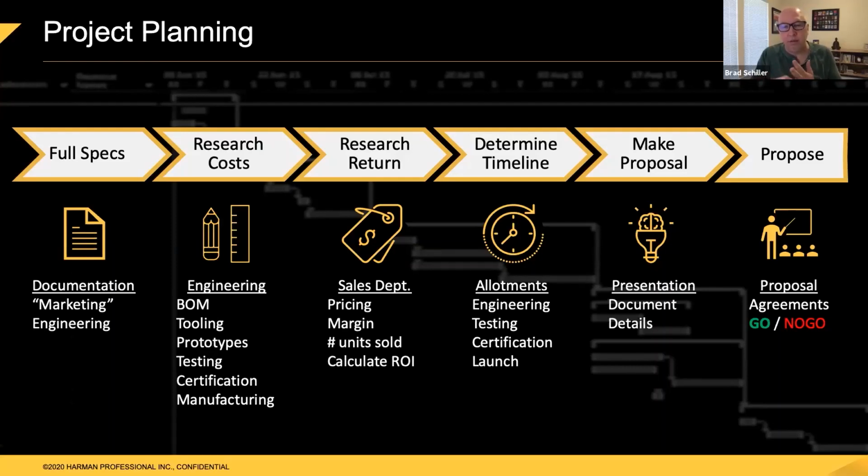Or they might look at it and say, well, it's going to cost $4 million to make. It's going to take 3 years. And it's a risky new type of product. We maybe could make $5,000, $6,000. They might say, no, we don't want to do it. Or, as I've seen happen before, they might say, well, we've got these other products we want to do, and we can't invest in this product now, so we'll delay this product a year. And they'll delay starting that product in favor of other products.